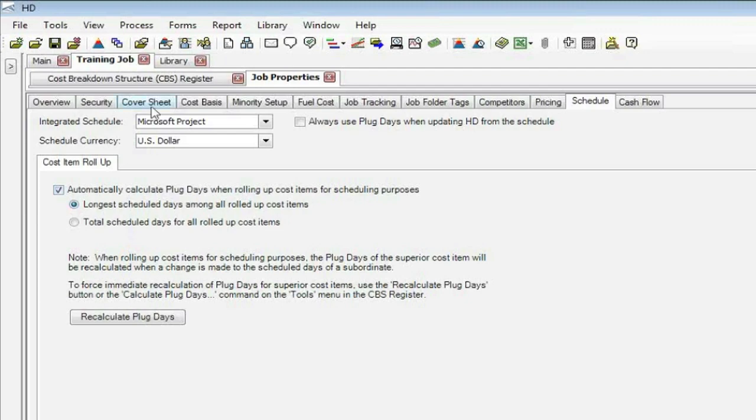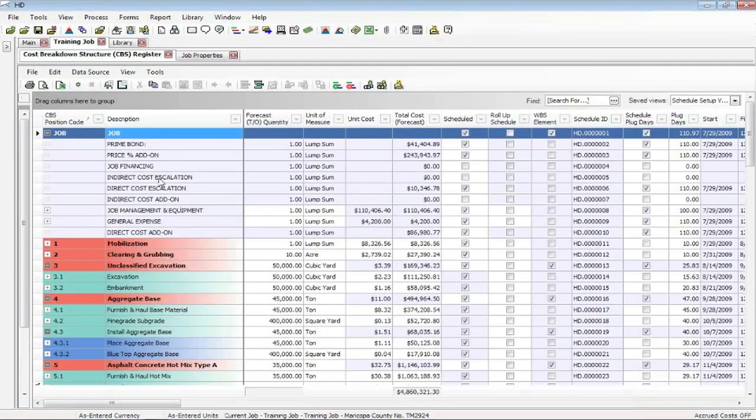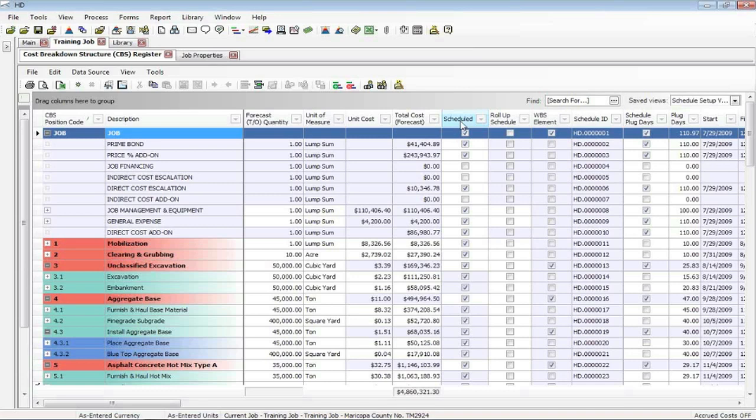I'm going to go to the CBS Register, and what I'm looking at is a view that we provided that basically shows the cost items and the columns that are specific to your decisions on what items you do want to send out to the schedule. Once we send your information out, the cost items out, we are dynamically connected, which means if you change cost items or add new cost items or change durations in the schedule, or excuse me, in the hard dollar, they will be updated in the schedule for us.